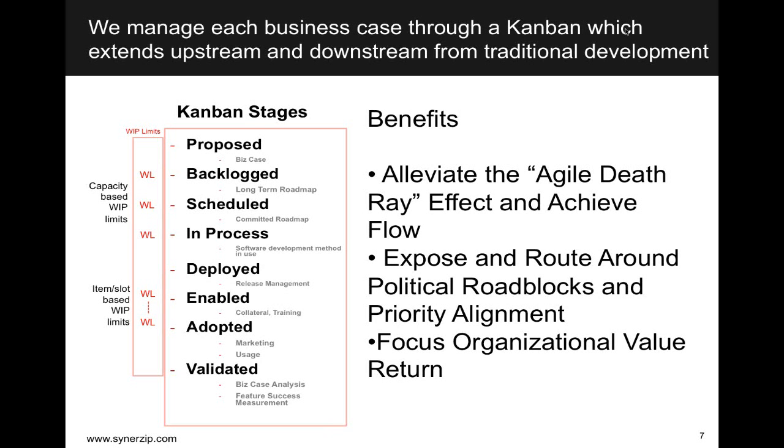So in other words, you're able to get features into production environments without necessarily releasing them to customers, so that in parallel you can be dealing with the enablement phase, whether that be generating collateral, generating training material, or the like for your organization. And then once it is released to customers, it's all about the measurement of adoption of those features. Is marketing running campaigns against the feature? Is sales actively positioning the features in sales cycles? Are users actually using the new features that popped up in their application?